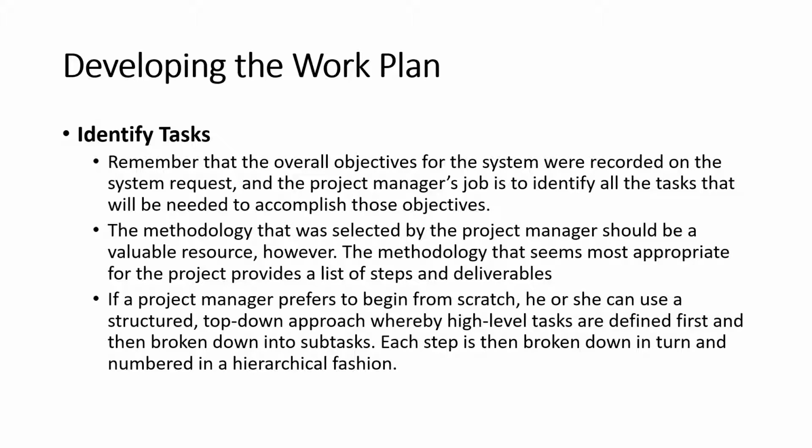The methodology that was selected by the project manager should be a valuable resource. The methodology that seems most appropriate for the project provides a list of steps and deliverables. If a project manager prefers to begin from scratch, he or she can use a structured top-down approach whereby high-level tasks are defined first, then broken down into subtasks. Each step is then broken down in turn and numbered in a hierarchical fashion.